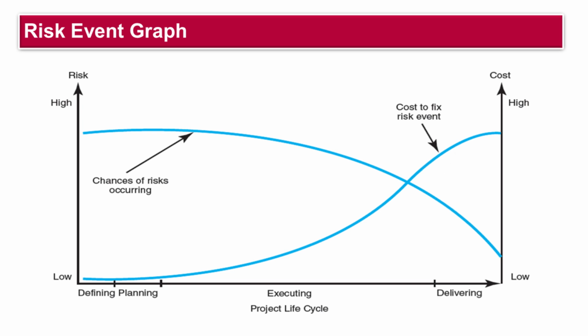In the early stages of the project lifecycle, uncertainty reigns supreme. Questions about timelines, costs, and technology remain unanswered, leading to a high likelihood of risk events occurring. These might include errors in time estimates, cost calculations, or design choices. However, at this stage, the project hasn't invested heavily, so the cost impact of a risk event is typically low. For example, discovering a minor design flaw during the planning phase is relatively inexpensive to fix compared to later stages.